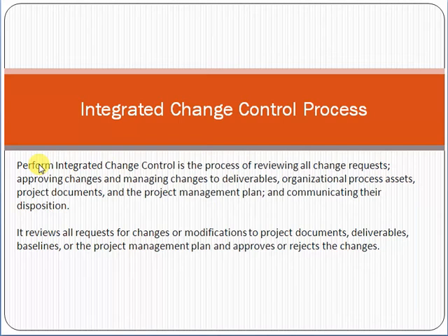The change control board means the project management, like the CEO, CTO, and the technical experts, who will be the authority to approve, reject, or defer that change. The change request form should have the impact of that change in terms of time and cost.